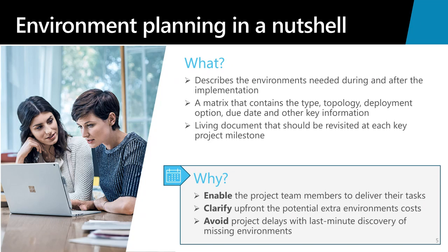Environment planning is very important in your project for several different reasons. The first reason is that it enables the project team members to deliver their tasks. What we mean by that is, if you don't have an appropriate amount of development environments, one for each developer, your developers can't do their development tasks. If you don't have proper training or testing environments, you're not going to have the right environments that your project team members and the business users need in order to complete those tasks to get you to a successful go live.